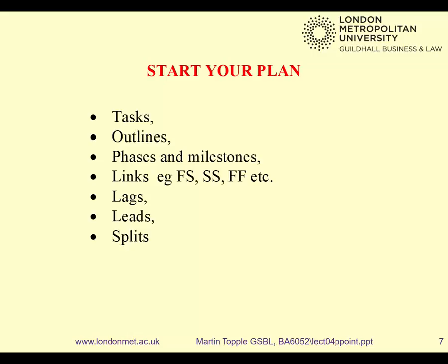And we'll also consider how you can split tasks. You've got 4 days work to do, but they don't all have to be done 1, 2, 3, 4. You could leave a couple of days gaps and then do another day. And that way you can spread your tasks around in a way that makes sense for your particular task in your particular project. And finally, we're going to look at how we can add constraints to our tasks.